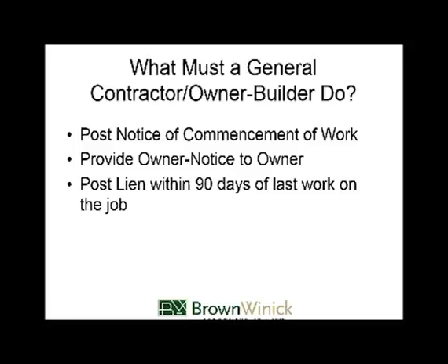If you aren't paid, you want to protect yourself and assert your lien claims, you got to get your lien, used to be filed, now it's posted within 90 days of last performing work. So those are the boiled down provisions of what a general contractor should do or an owner builder should do.